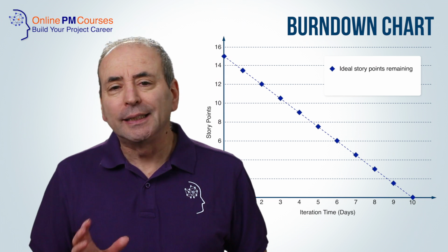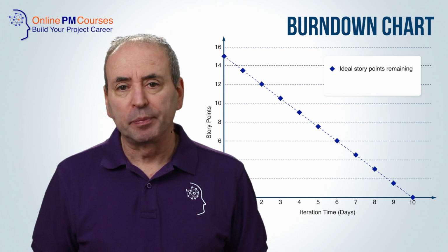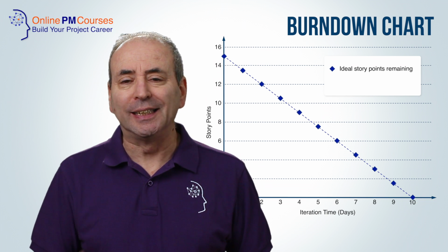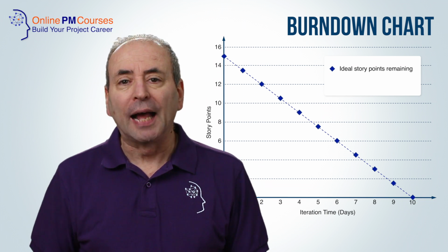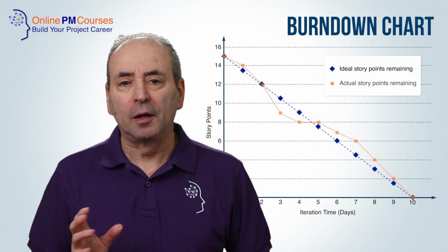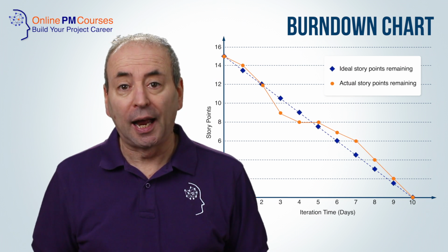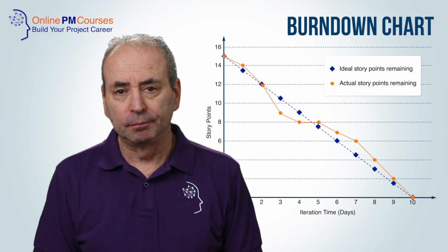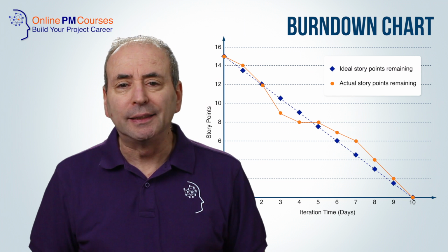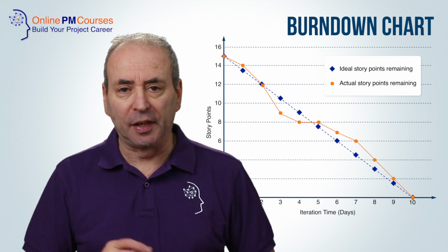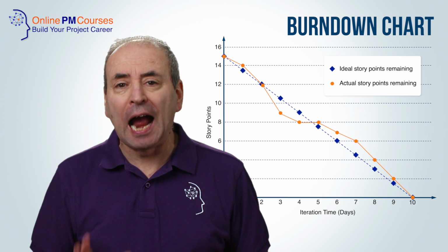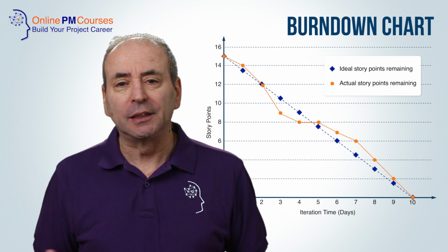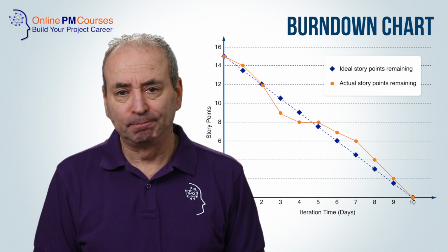We can get an idea of our progress against schedule if, at the start of a cycle, we plot an ideal work curve, and then if we plot work completed onto the burn chart as we go, we can see how the two compare. Clearly, when we plot the ideal or planned burn curve initially, if we use hours as our estimate for the amount of work, then we would expect to see a straight line.